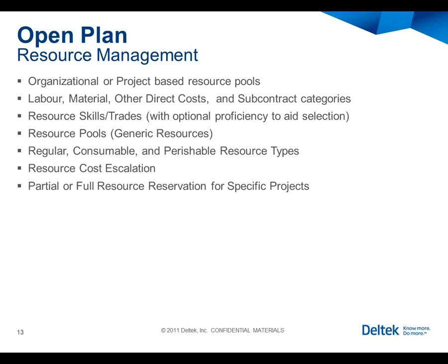Resources are the basis for calculating costs within a scheduling system. Those resources can be defined down to the skill or trade level. And we can optionally define proficiencies, which will aid in selection of resources so that we can be more proactive about which resources we assign to tasks within the schedule.